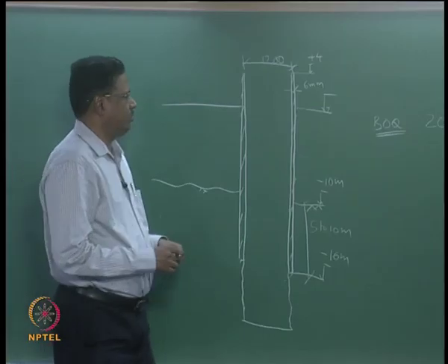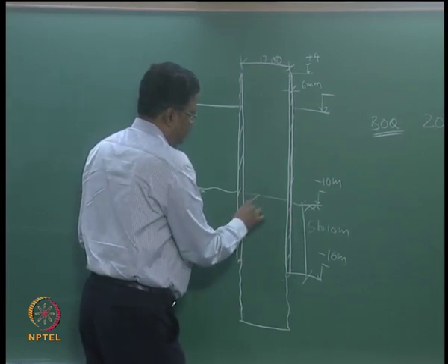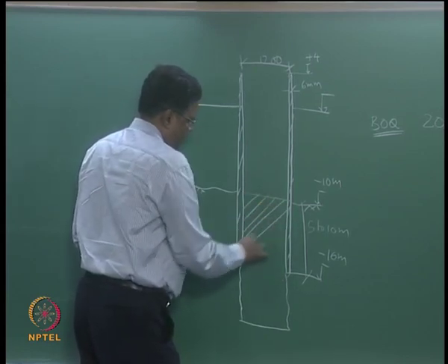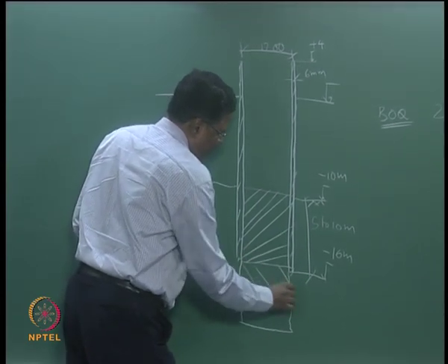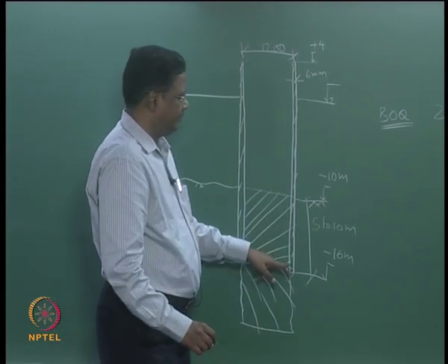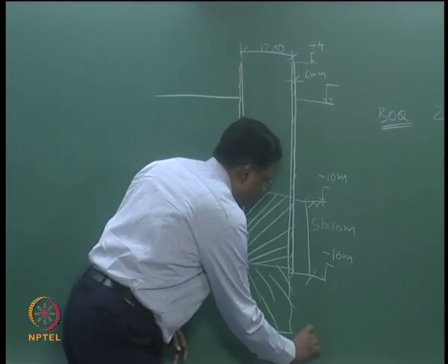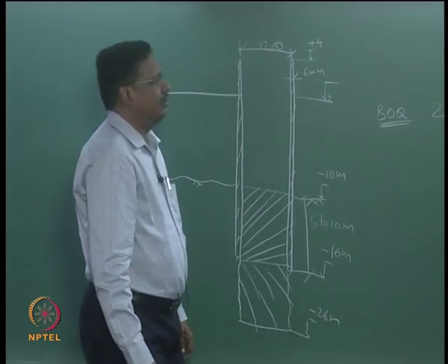Then when you are boring through soil, this is the level at which you have the soil, so you have to bore through this. Suppose this is a soft soil, you have one rate, this is the hard soil, this is another rate. So here the depth is about 6 meter, let us say the pounding level is about 26 meter, and this is 10 meter. So boring through,